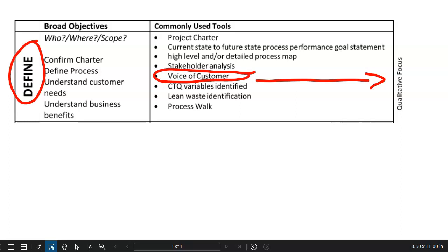So we do stakeholder identification as a precursor to voice of customer interviews to make sure that the individuals and groups of people and the systems that are affected are exposed first to prepare us for who we should be spending our time on interviews. Stakeholder identification in a process improvement project is primarily used to help us prepare for the interviews.